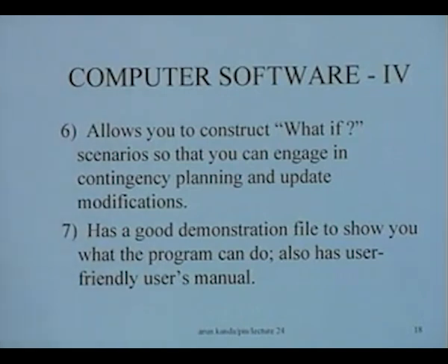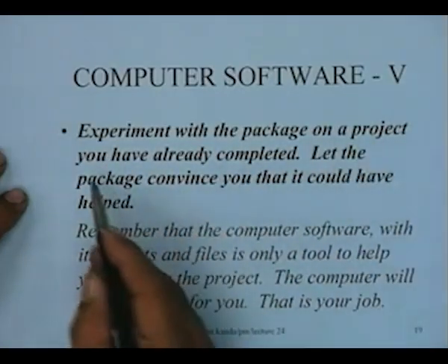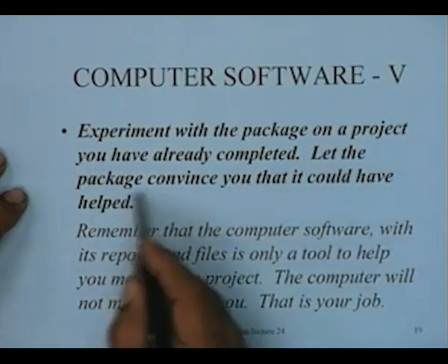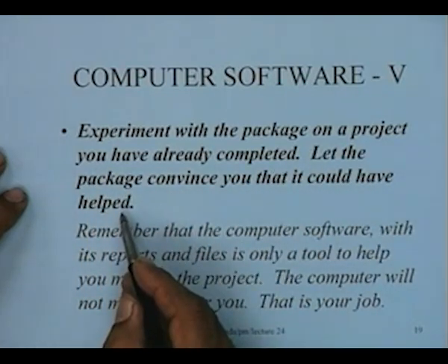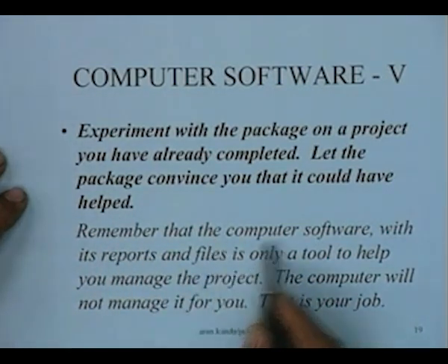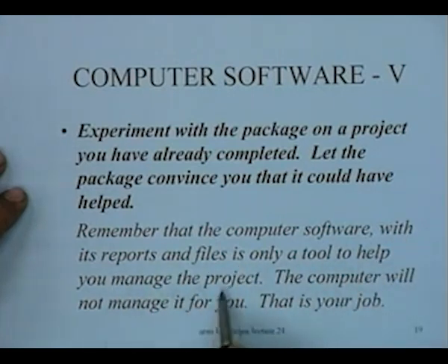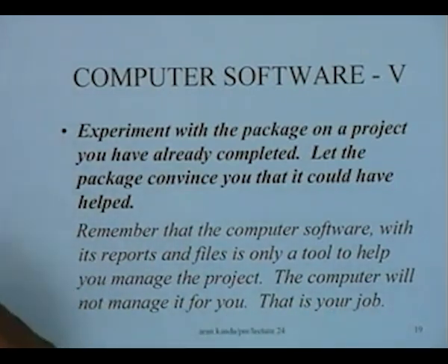That is important. So after you have done these 2 things, depending on what you want, and these are the minimum features, they say that it's a good idea to experiment with the package on a project you have already completed and let the package convince you that it could have helped. So this is like the test ride before you drive the car, right? It's exactly that. So remember that the computer software with its reports and files is only a tool to help you manage the project. The computer will not manage it for you. That is your job. So in that sense, remember that it's a tool, and when you use or buy a software, you should make sure that it performs all these various kinds of functions.